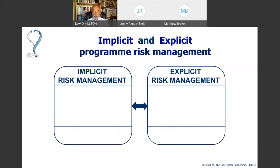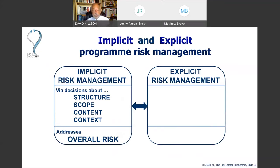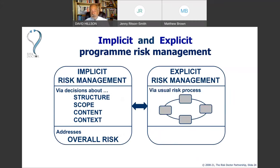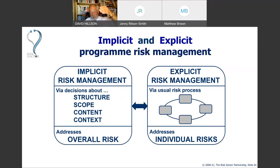To summarise the two levels: we manage the overall riskiness of the programme implicitly by considering the structure, scope, content, and context of the programme as a whole — maintaining risk efficiency. Explicit risk management uses a typical risk management process to address individual risks within the programme. With these two levels together, we can tackle risks that come from above and below, and also risks at the level of the programme itself.